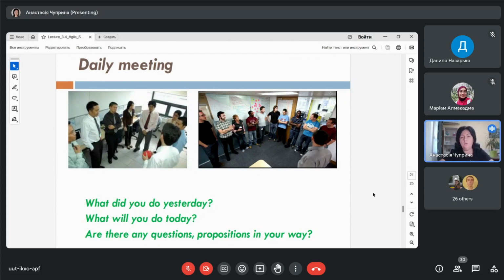During the meeting, all the team stays together, and each of the team members answers 3 questions. What did I do yesterday? What will I do today? And if I have some questions, problems, propositions. So it's a very short meeting, about 15 minutes, but each of the team members should answer these questions.